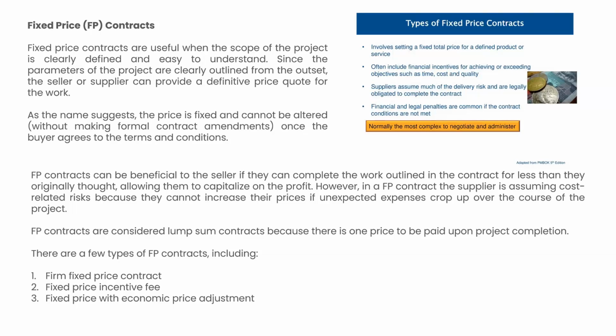So say, for example, for 1,000 kg a bundle of cotton is priced at 10,000 rupees. That price won't change till the end of the project. But in the market, the price of the cotton bundle may change, may go up or come down. But that doesn't affect the price already mentioned in the contract.